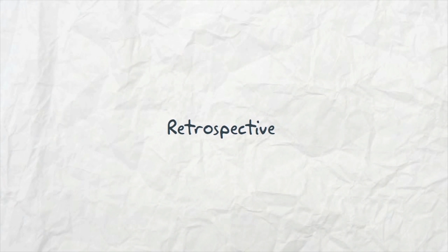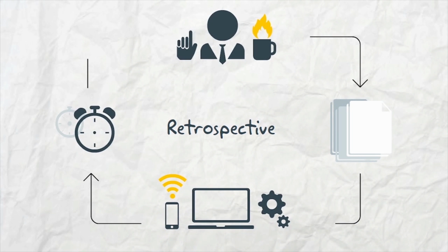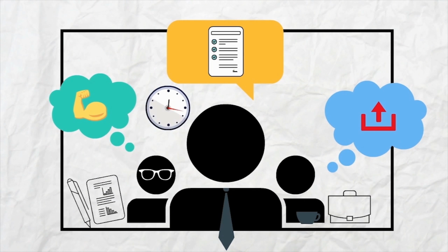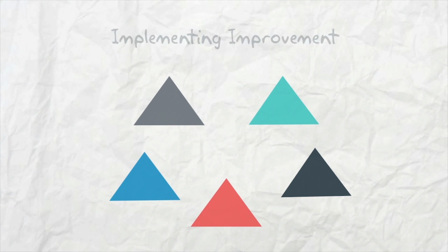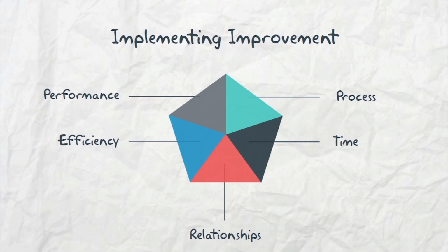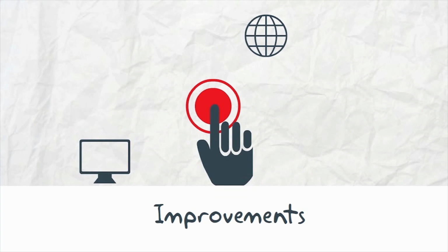During each retrospective, the Scrum team plans ways to increase product quality by adapting the definition of done as appropriate. By the end of the Sprint Retrospective, the Scrum team should have identified improvements that it will implement in the next sprint. Implementing these improvements in the next sprint is the adaptation to the inspection of the Scrum team itself. Although improvements may be implemented at any time, the Sprint Retrospective provides a formal opportunity to focus on inspection and adaptation.